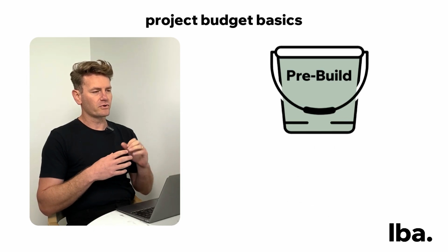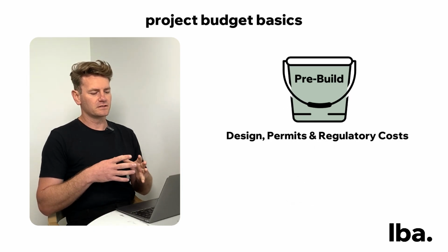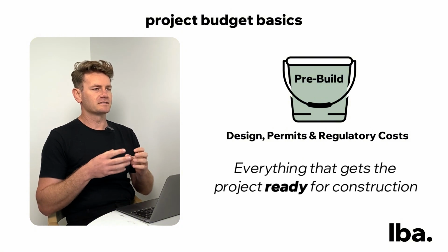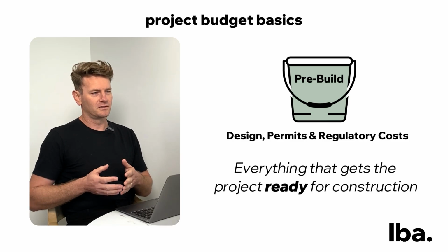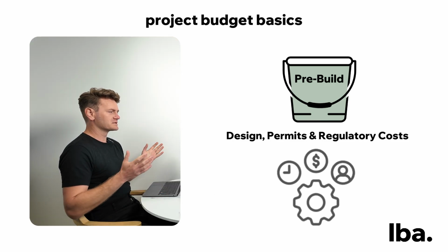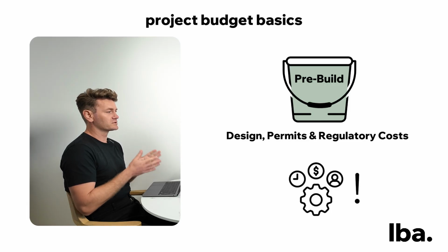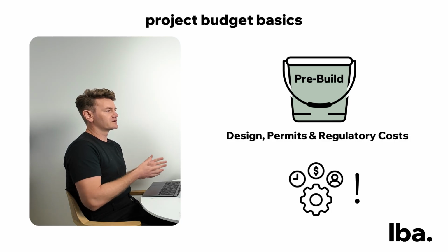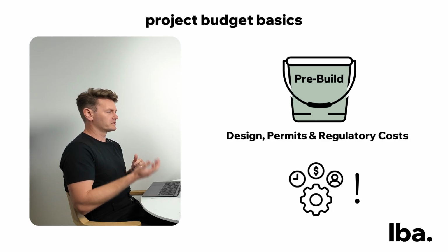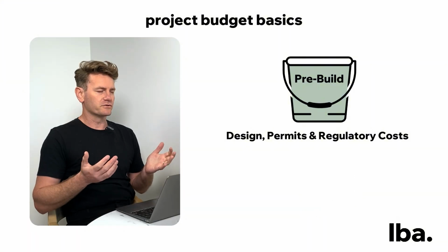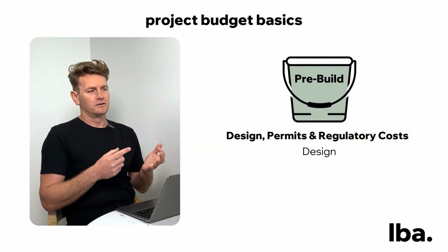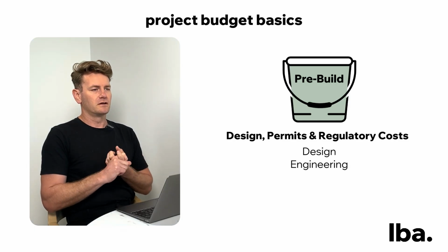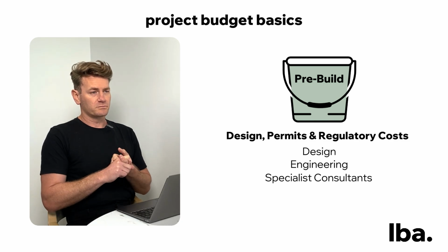But then the pre-build bucket, that's considered the design, permits, and regulatory costs. So that's everything that gets the project ready for construction. And you can imagine that there is a significant amount of time and a significant amount of resources that goes into that portion of the process that is typically unaccounted for when people think of a building project. That includes things like professional fees, so design and engineering services, as well as any experts that are required for your specific project.